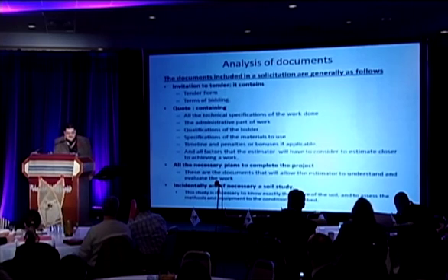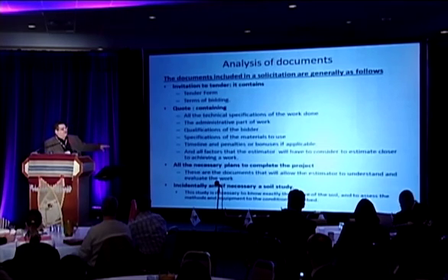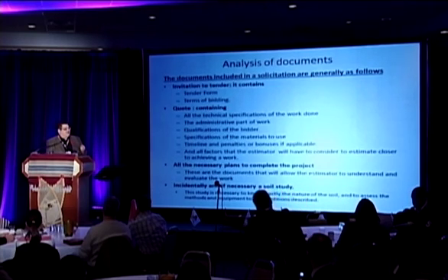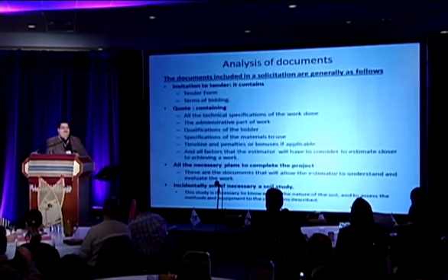losses on that contract. Sometimes also the soil studies that are provided in the bid document will not reflect what's on the field, but having the bid document and their study, the soil studies, will give you some backup later on when you come back and say, look, I had a hard time because the soil study did not reflect the actual conditions where I was doing the contract.